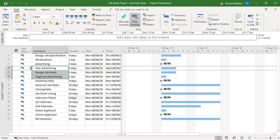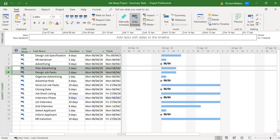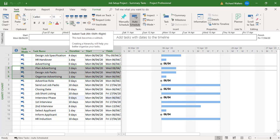We are going to highlight all three tasks, and I tend to highlight tasks from the task number area. So 4, 5, and 6. On the task tab in the schedule section of the ribbon, you can then choose the option indent task.